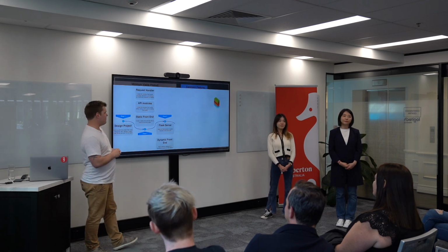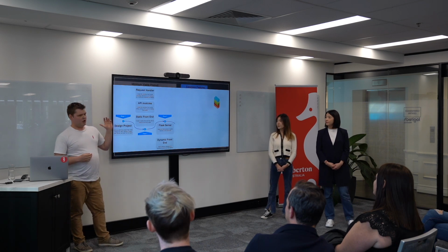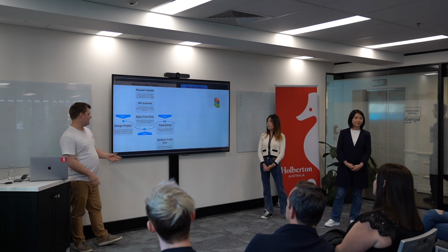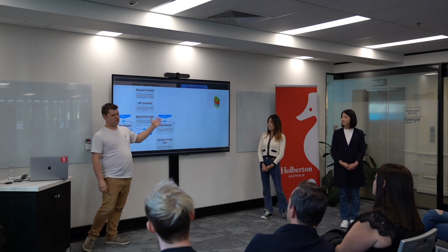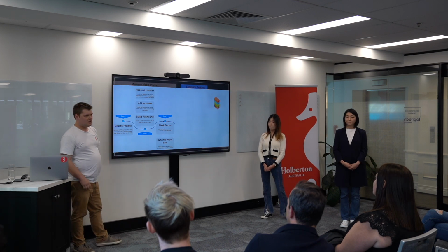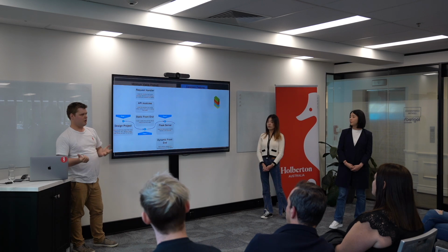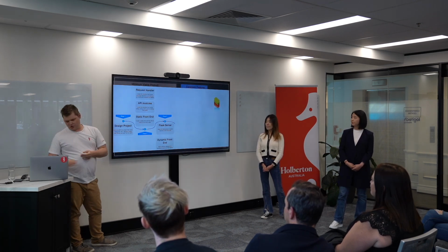I say sort of, it's pretty much out of the textbook. We broke the minimum viable product down into 3 sprints, pretty clearly defined with what we wanted to achieve, and then each of these user stories were broken out into cards and tasks to handle and follow, just using a Trello board to keep track of every task as we did it.